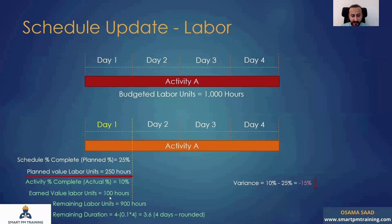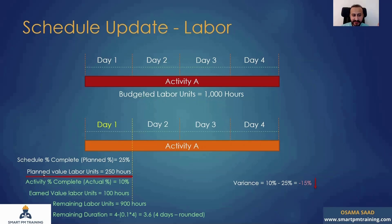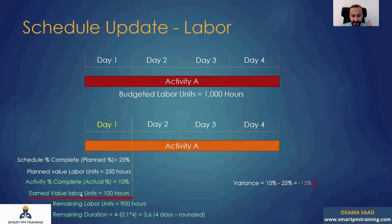The earned value labor units are 100 hours. This is not actual — it's virtual. There are three different labor unit factors. The first is planned value labor units: 25% times 1,000 hours equals 250 hours. The second is earned value labor units: 10% times 1,000 hours equals 100 hours. The third factor is the actual hours spent on site.